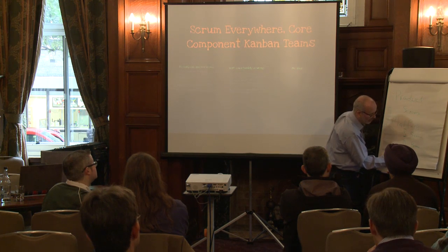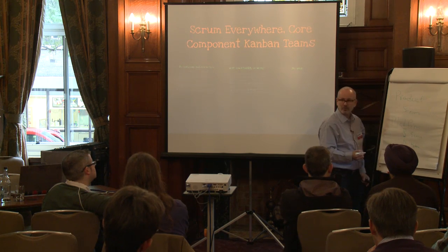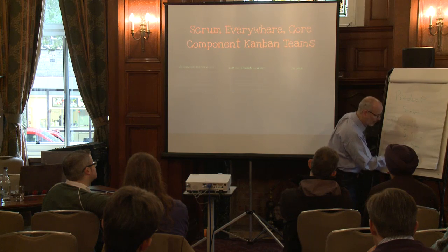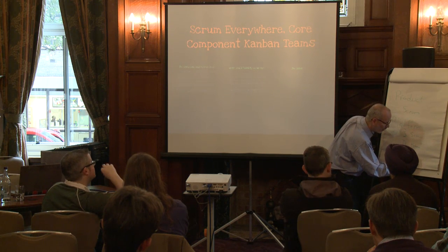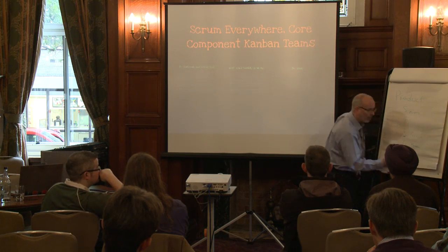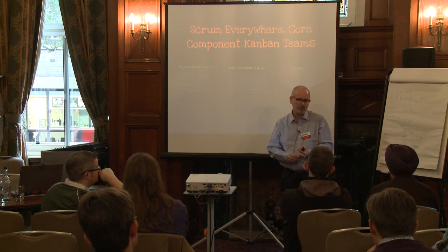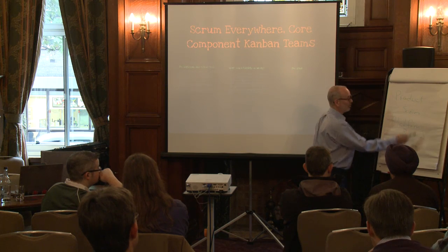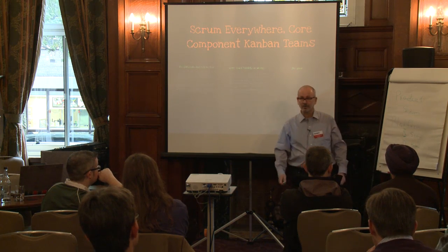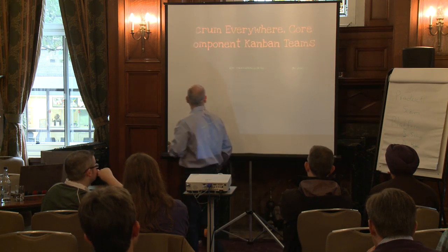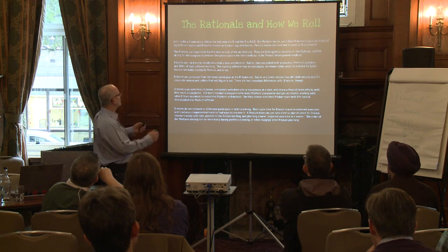But they need to split out and embed with the various product teams. And I'm starting to call that splitting up into squads, right? And the squads are anywhere from 2 to 4 people that will then work embedded with the product teams. So, whoa, there's a lot of words out there.